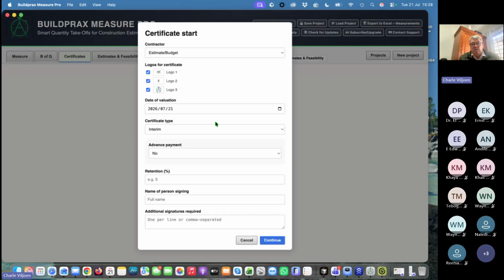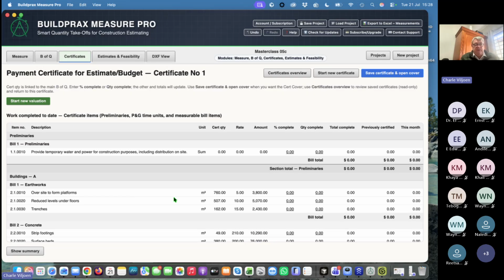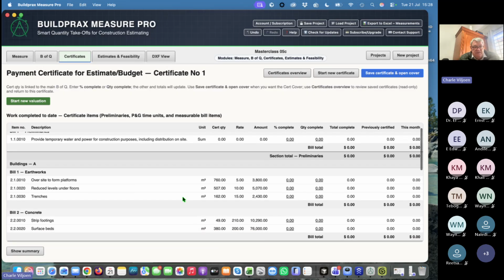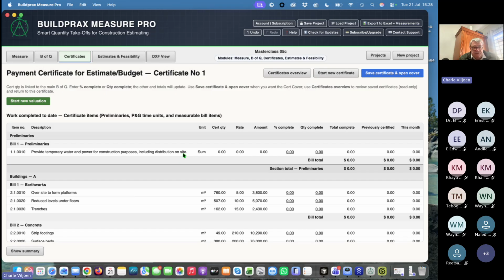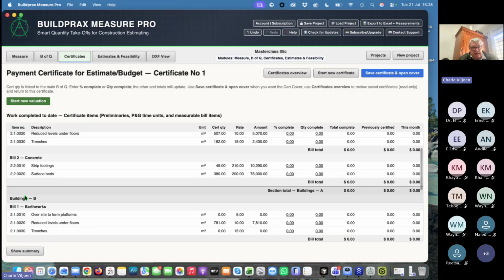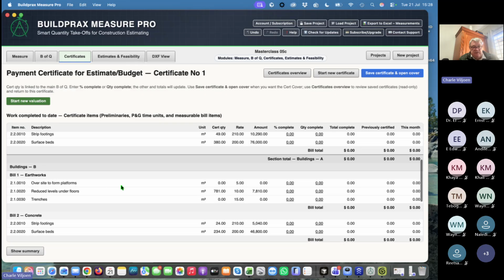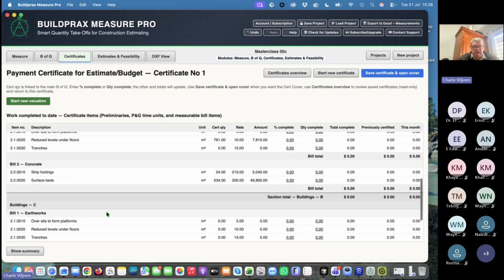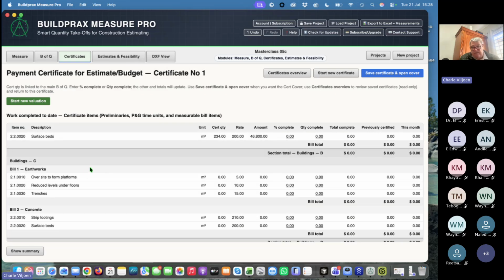We've been through this before, and it is on our YouTube channel. It's easy to get, and we just continue with our certificate. But what I'm trying to say to you is, in our certificate page, we will see it now extracts all the buildings, all the items for building A that has been measured. So A will have bill number 1, bill number 2, the concrete, and building B is going to have the earthworks and the concrete, and building C, whatever we have measured there.